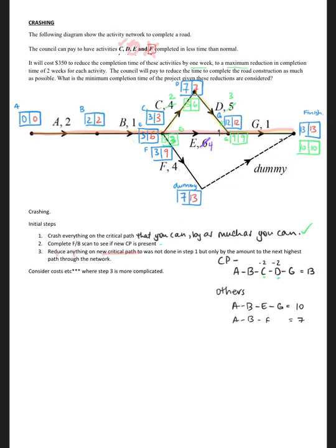I'm going to do that in purple. So that would become 7 in there. And then before I get too carried away, if I was doing a forward and backward scan again, this way coming through here with these already reduced. I've already done that. That's locked in. I'm not changing that. So 2 plus the 3. So coming in, I've got 5 plus the 3 is 8. So if I've made that reduced by 2, coming in this way is 7. Coming in this way is 8.